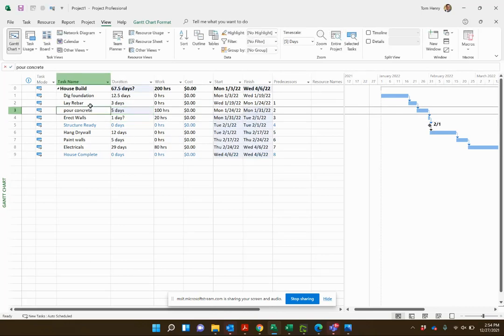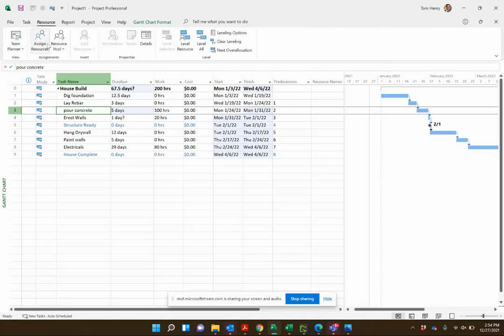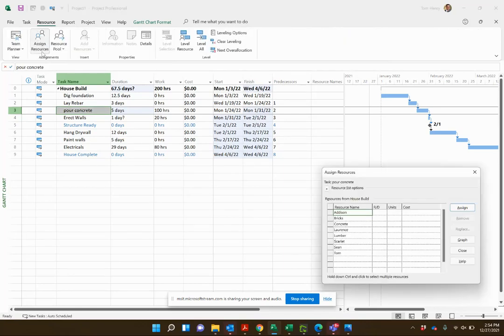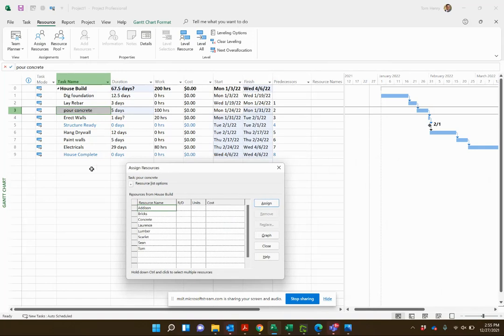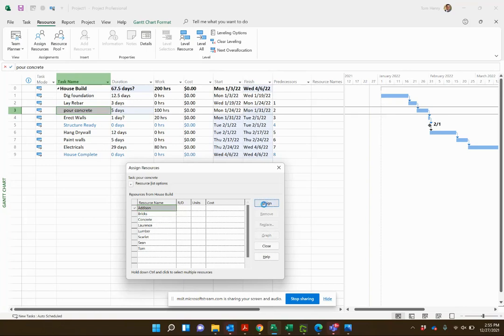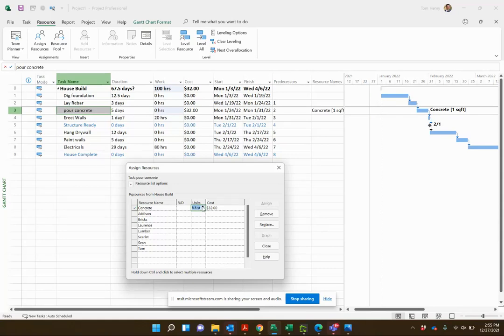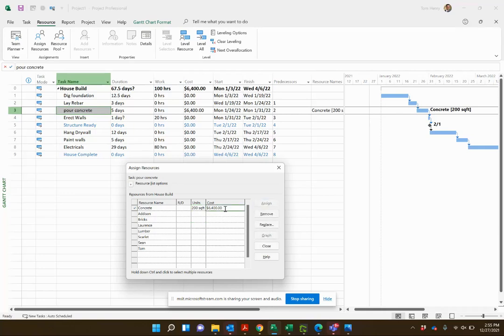Let's go ahead and assign some concrete. I'm going to say it's probably going to take us five days. How much concrete do I need to do this? I'm actually going to go to the resource ribbon and I'm going to click assign resources. This gives us the assign resources dialog. This is one of my favorite ways to do this. I'm going to come in and say pour concrete, I'm going to need some concrete. Assign that, how many units? Let's say 200 square feet.